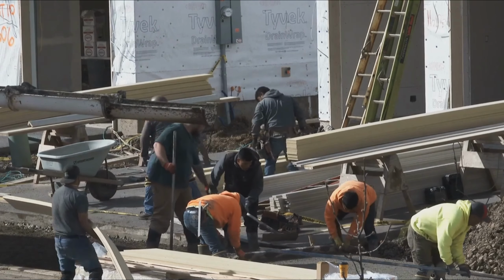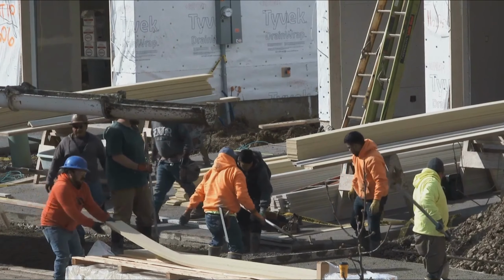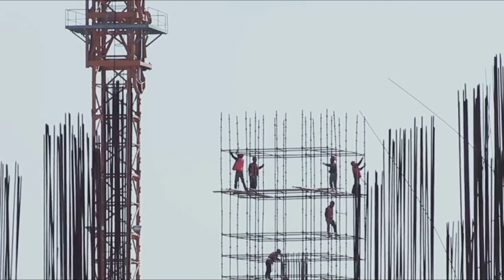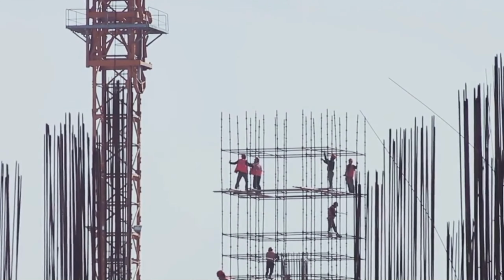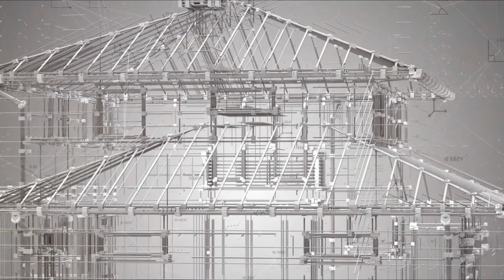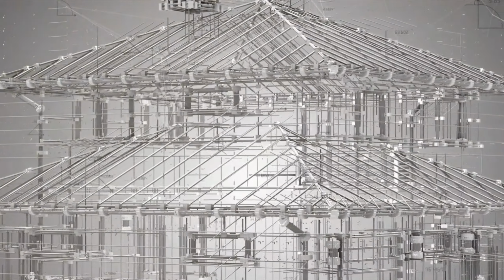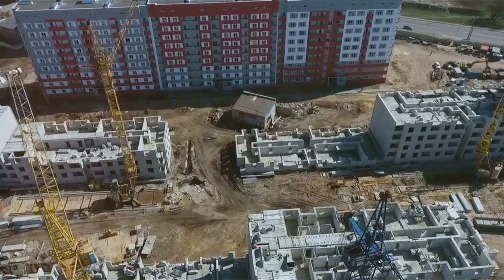When the dust settled and the last of the construction crews had packed up their gear, the final price tag was a staggering sum that left jaws dropping nationwide. The Big Dig had ballooned into a massive $14.6 billion venture. That's right, folks, it exceeded its original budget by more than 5 times. So what exactly went wrong here? Well, the devil, as they say, is in the details. The Big Dig was plagued by a multitude of problems, including design flaws, poor management, and rampant corruption. There were delays, safety issues, and lawsuits, each adding another layer to the mounting costs.